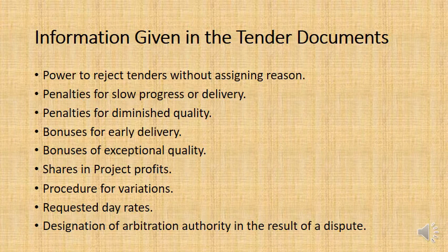So as well as that, you also have a statement saying that the buyer, the engineer, does not have to give a reason for rejecting one tender over another. That's just needed to be put in there as a legal backing. Now, usually there is an ethical thing where we do give feedback to all contractors and say, we thank you for submitting the tender.